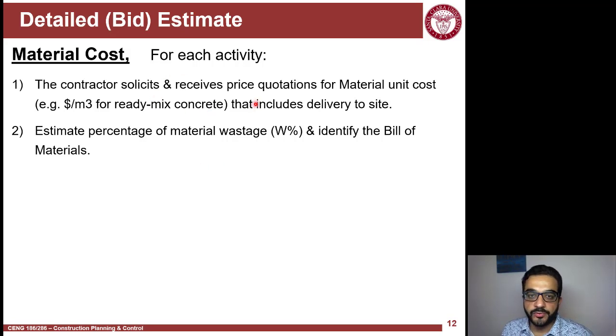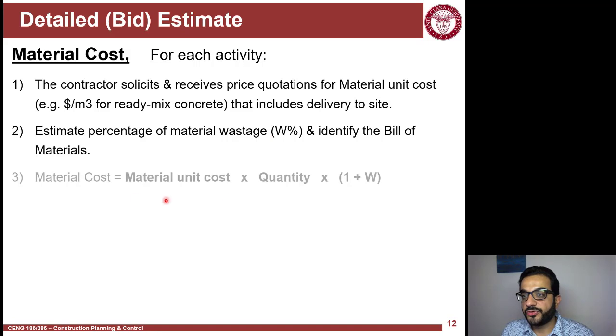Once you get the price of the material, dollar per linear foot, dollar per square foot, you account for the waste. For every material, from experience, people say, when I cut it on the side, I have this amount of waste: 5%, 10%, 1%, depending on the activity you're doing and the material you're using. Typically it's a 5% waste percentage. So this is the bare material cost.